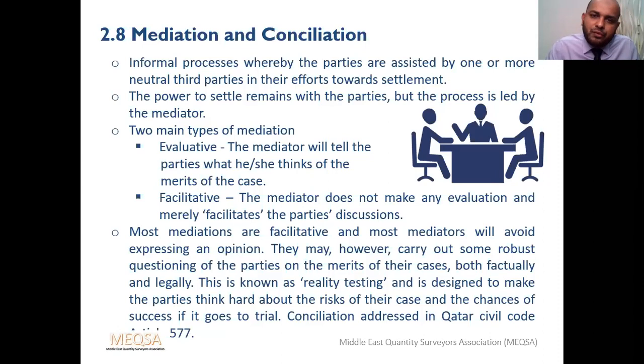And another thing is, conciliation is addressed in the Qatar Civil Code, and most civil codes as well. Civil Code Article 577 talks about conciliation, encouraging parties to go for conciliation, and other contracts also.